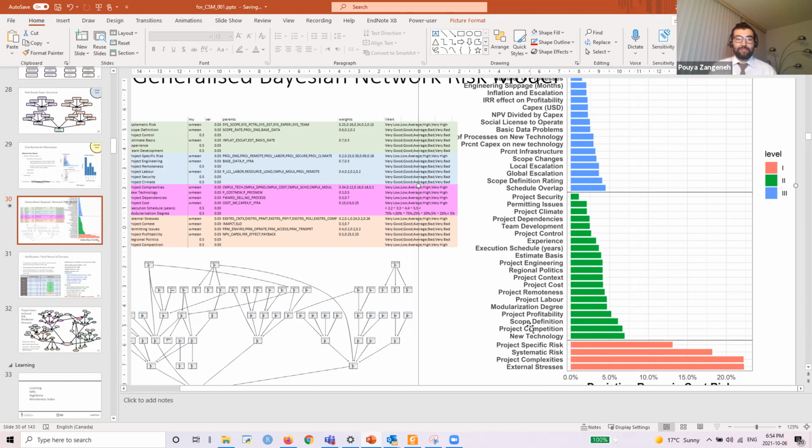And by that, I mean regional competition that could be created for a project. Essentially, when there is a boom in a certain part of the world, all the prices would go up. Contractors would outbid each other, or basically, contractors wouldn't outbid each other.